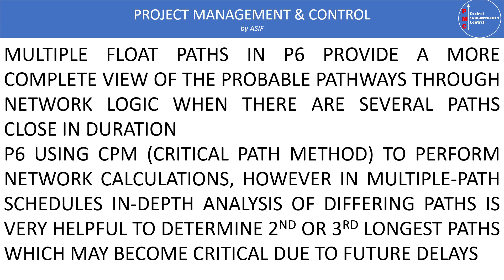Once we perform critical path analysis, the program calculates the critical path. In addition, we need to determine near-critical activities — the second or third longest paths — so we know which activities to monitor to avoid future delays in the project.